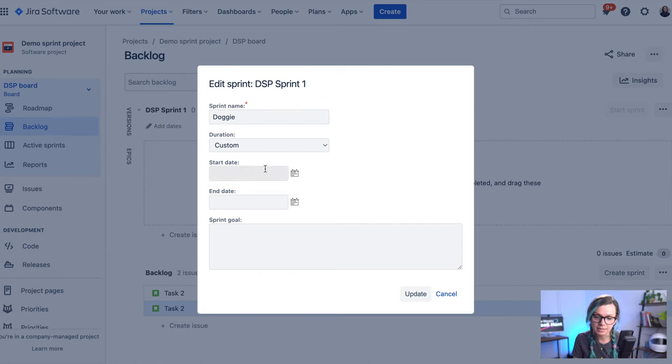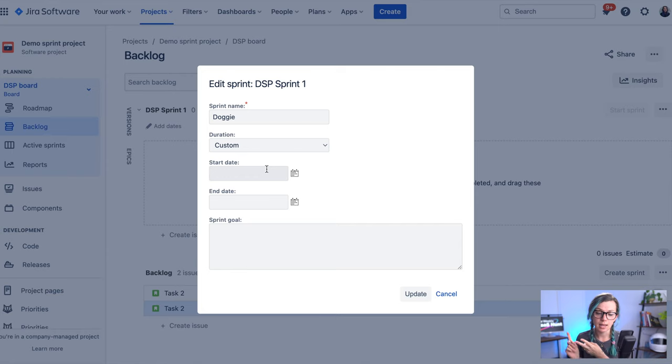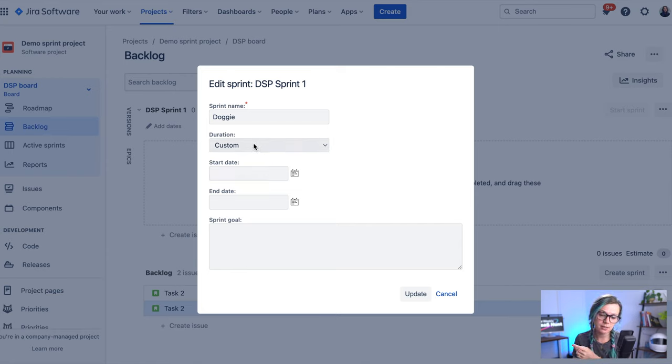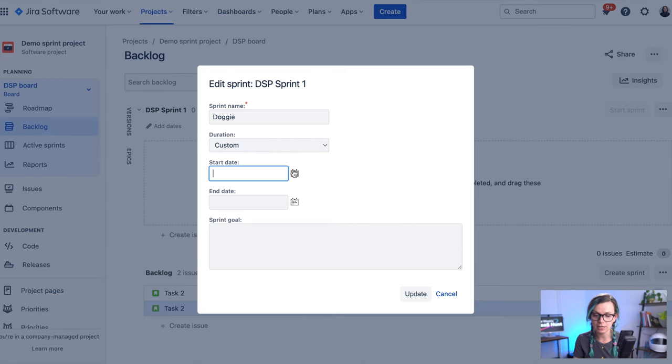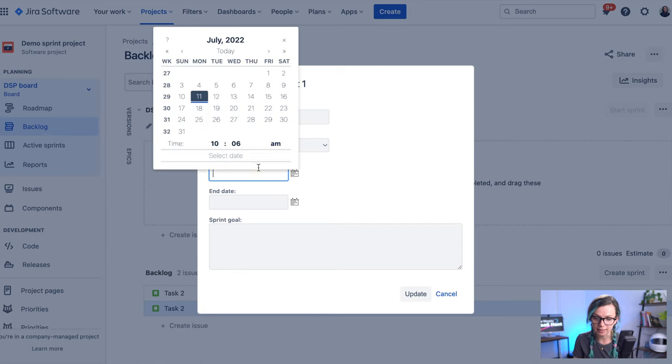And then here there is an option to fill a start date and end date. So you can either select the custom duration. So if you would like to have your sprint for just 10 days or something like that, you could select it here.